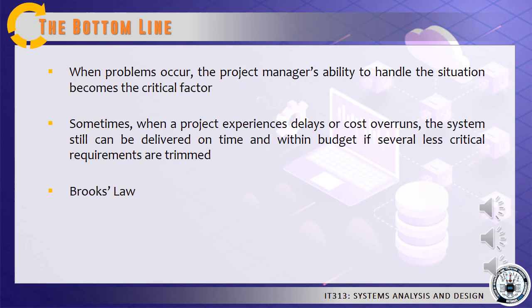In some situations, adding more people to a project actually might increase the time necessary to complete the project because of a principle called Brooks' Law. This interesting concept was stated by Frederick Brooks, Jr., an IBM engineer, who observed that adding manpower to a software project only makes it later. Brooks reached this conclusion when he saw that new workers on a project first had to be educated and instructed by existing employees whose own productivity was reduced accordingly.